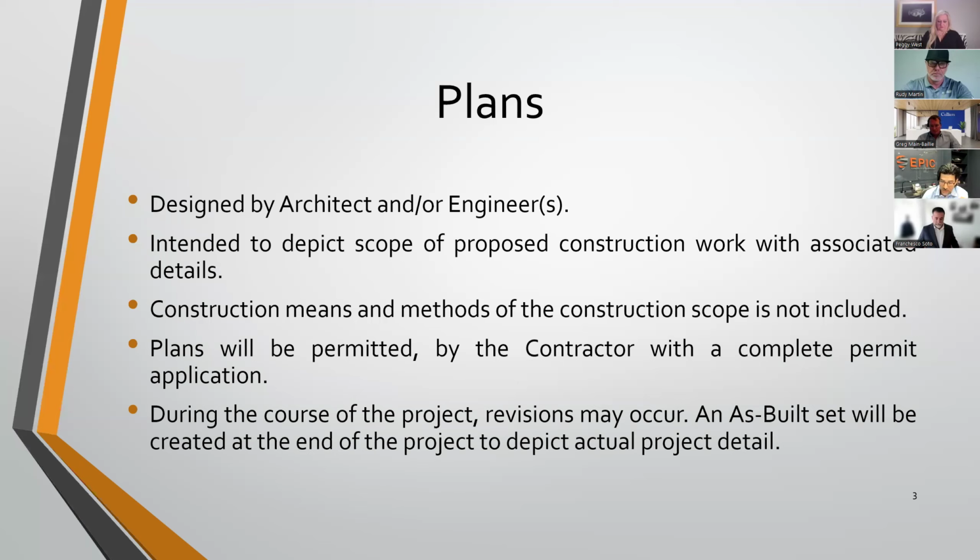And when we get into the detail further in the discussion, ultimately you're going to start off with a bid set of plans, which we'll arbitrarily call a 90% set or a 75% set of plans. That is intended to be distributed to all the bidders, all the construction bidders. They're going to come back. They may have questions along the way that may necessitate actual modification to those plans. But either way, all those numbers come back on that bid set.